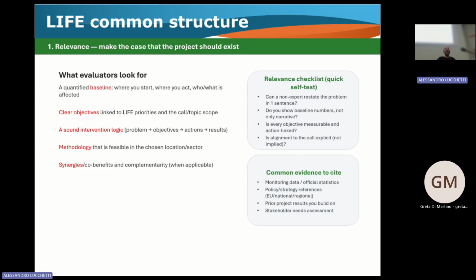No. You have to say, in Italy, according to this paper, the amount of turtles caught are these, with this gear in this specific area. The numbers of that are these. So when you are speaking about baseline, you have to report numbers, okay?